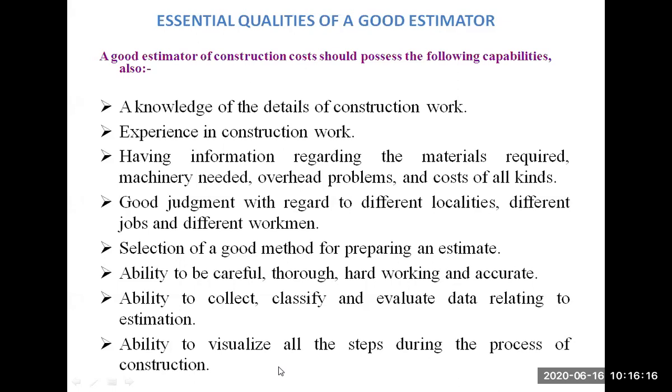For completing a project in a successful manner, you require a schedule for each and every day. Once again, I'm going to repeat, this will help you in future while working on the site. Always make the schedule of the work which you are going to complete for the next day. That means on the next day at 10 a.m., whenever you start your work, at first you are going to complete the column work, at first the excavation part, at first the painting work, whatever the different works that we have.